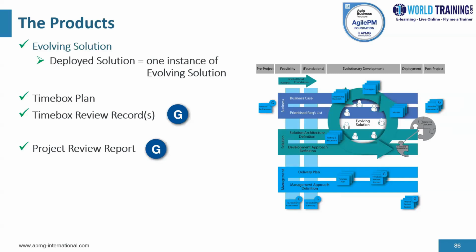And then we have the time box plan, which provides depth and detail for each time box identified in the delivery plan. It elaborates on the objectives provided for that time box and details the deliverables of that time box, along with the activities to produce those deliverables and the resources to do the work. And the time box plan is created by the solution development team and is often represented on a team board as work to do, in progress, and done. It is updated at least on a daily basis at the daily stand-ups.